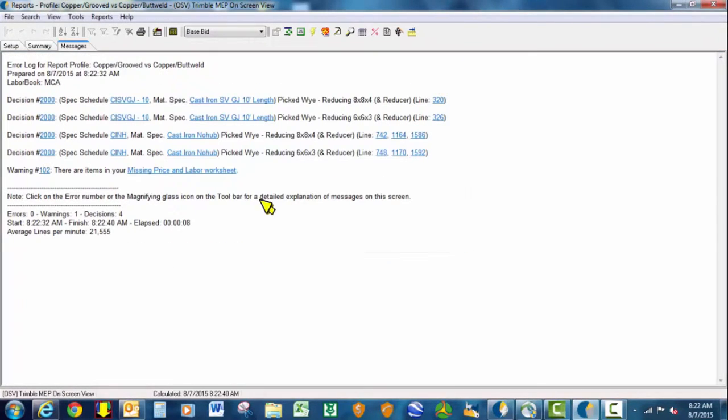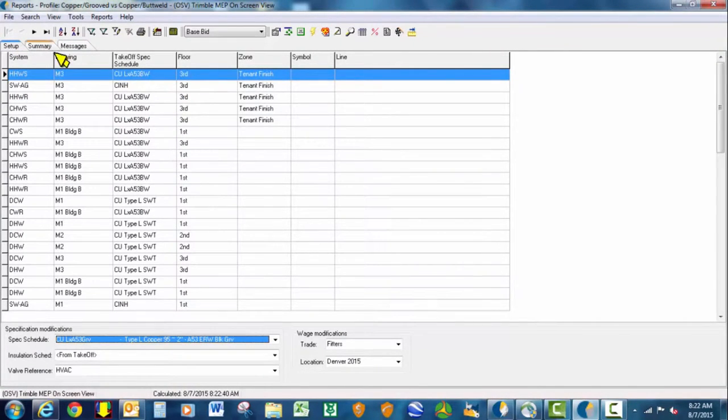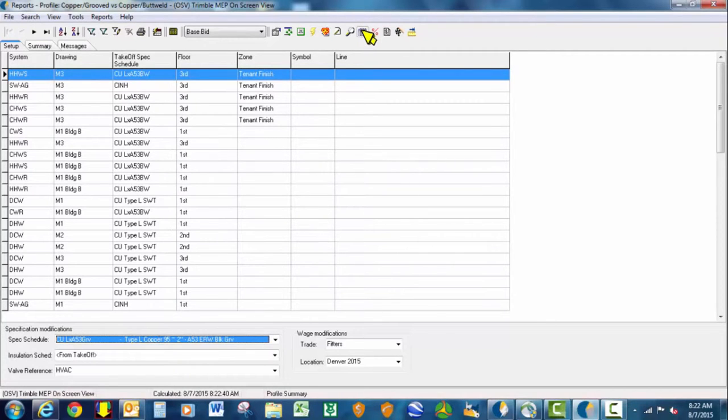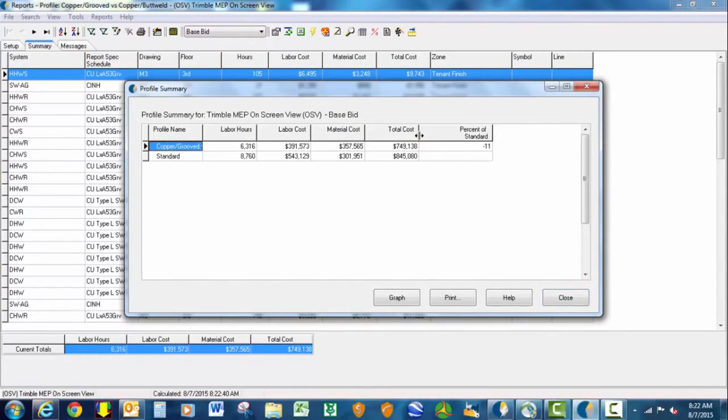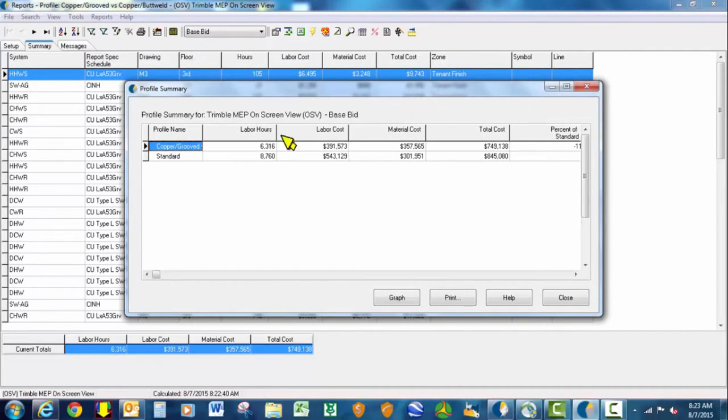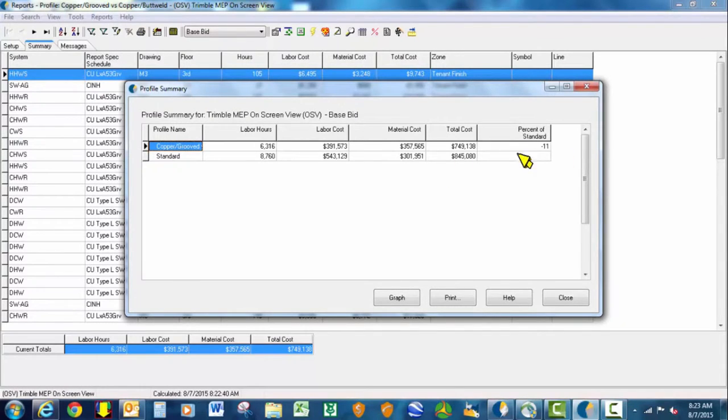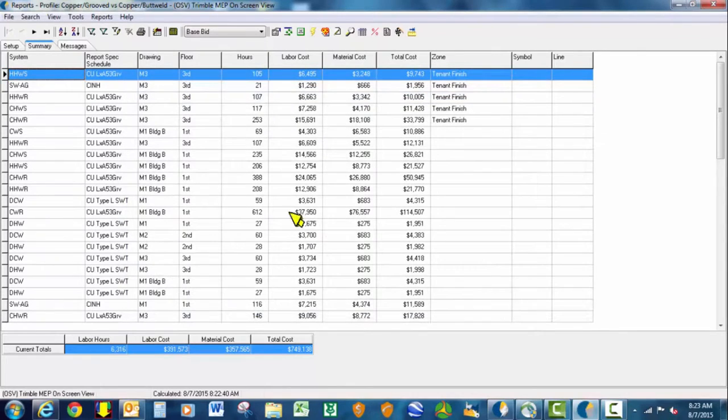You can save as many of these profiles with your job as you'd like for different scenarios. If we come up here to this profile summary icon to the right of the magnifying glass and click on that, it tells us that by changing all copper butt weld to copper grooved spec, we would be saving 11% off of the base bid cost. These are raw dollar costs before profits and overheads. This gives you a quick value engineering option.